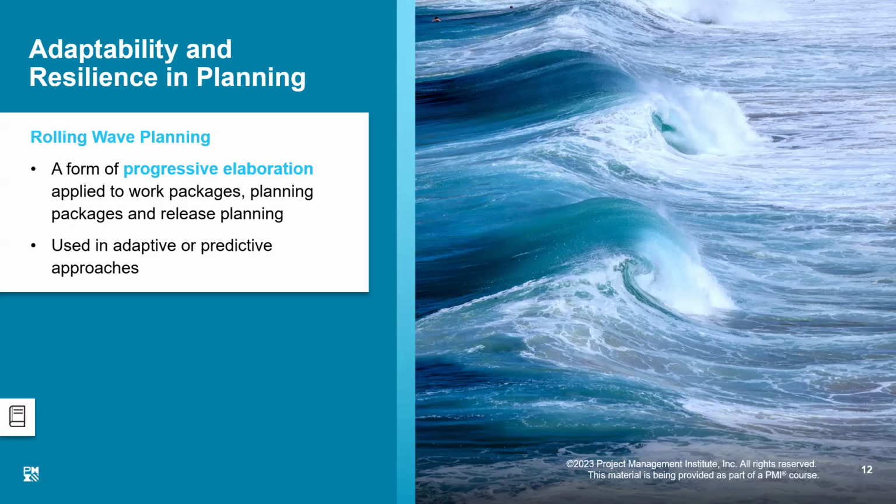Like, you have a project with 5 phases. You can have a general understanding how this project will go on, but phase one is very clear to you. So you elaborate in much more detail about phase one. And once phase one is completed, then you start deliberating on phase two and so on. So as you move ahead in time, you will keep progressively elaborating. And that is a strategic level concept.